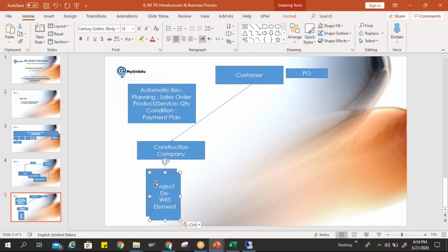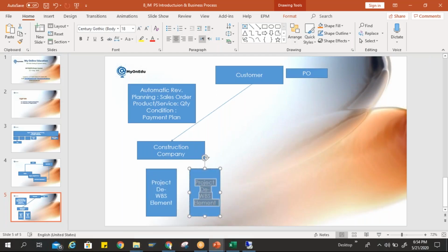The first thing we have done is cost planning, rough cut cost planning in version, let's say X. You can have multiple versions, 1, 2, 3, 4, 5, likewise. And then you can copy these versions from one version to another. And then you can plan the final cost planning in version 0.